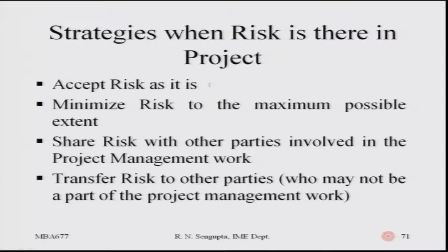Share the risk with other parties involved. So, if there is a risk from your side, try to pass it on to the vendor. Obviously, there would be contracts for that, such that if there is a risk being borne by the vendor, the vendor should also get some benefit.